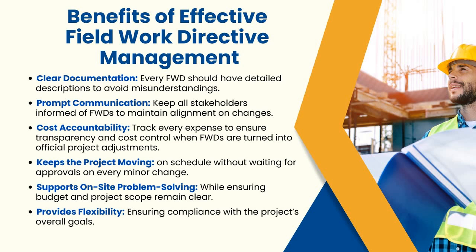There may be times when we even know that the work that we're doing isn't 100% valuable. So for instance, if we have a weather delay and we're putting rock down in the mud and we are trying to provide stability in a certain situation, but we'll know that we'll never be able to use that base rock again, there's going to be money lost in that situation. But in the overall big picture, it was important in order for us to be able to keep the work moving.